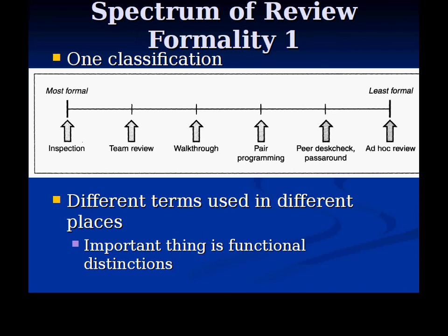Okay, now a key thing to realize for delivering on the peer reviews for this class is I require inspections for peer reviews. These are formal peer reviews that I'm providing some slides on here. They involve preparation before the review. They have a separate person presenting than the actual author of the document. They involve later checking whether the results, the outcomes of it, were in fact put into place. In other words, the recommendations, were they in fact put into place when there are such recommendations. They involve multiple parties, etc.